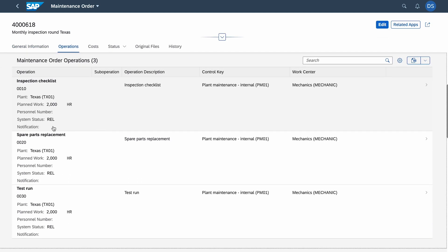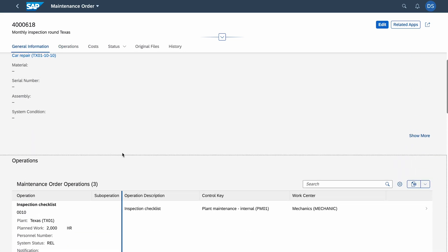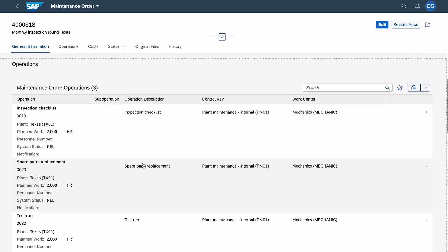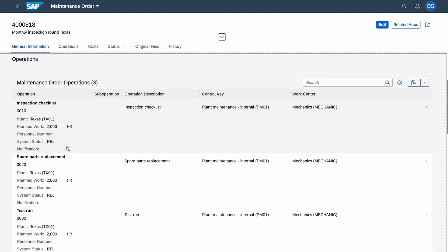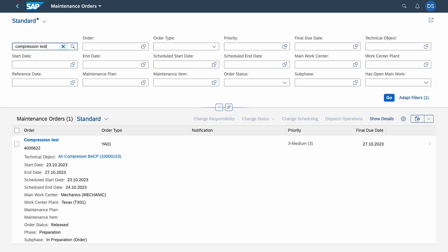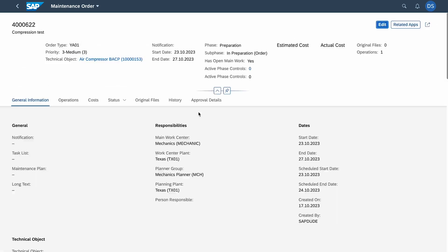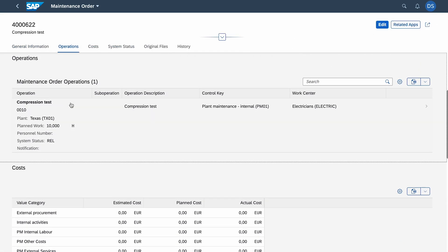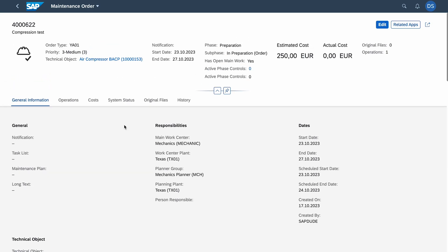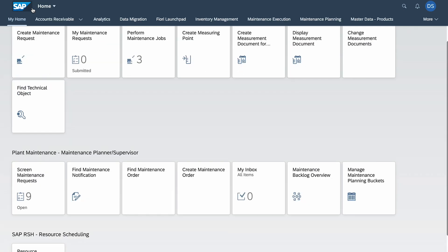This is the order. I defined three operations: spare parts replacement, inspection checklist, and test run. These tasks are all for mechanics. Here you can see we have two hours for the checklist, two hours for spare parts replacement, and two hours for the test run. The order for electricians is compression test.